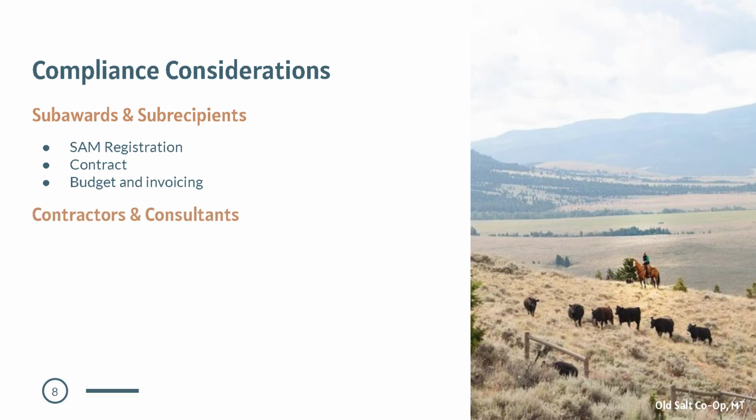Next, let's talk about contractors and consultants. These are experts you brought on board to handle specific tasks in your project. Their costs are associated with purchasing goods or procuring services. Similar to subawards, you'll need to communicate clearly the budget and deliverables to your contractors or consultants, and they, in turn, are responsible for completing those deliverables and sending you invoices for payment. We recommend having a signed agreement with each contractor, but keep in mind there are federal rules around procurement, which we'll cover in more detail in a future slide.